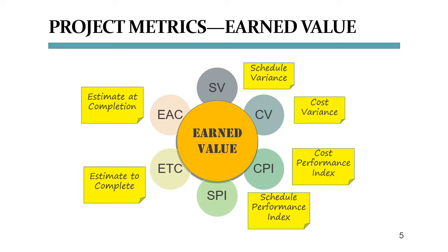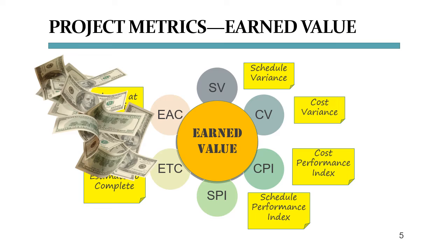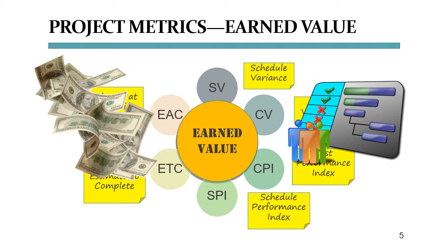Speaking of which, at the center of this graphic is the term earned value. The idea behind earned value is to know at any point in the project whether the money you have spent on getting work done is really producing the value that you originally planned to buy at this point. So earned value measures the amount of work that is done at a certain point in your schedule, and it looks at how much you paid for it and how much of it is on time and how much isn't.